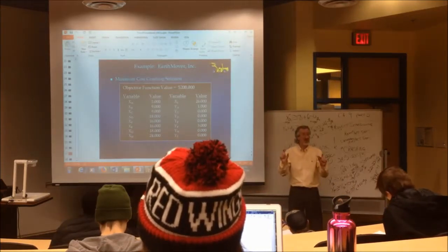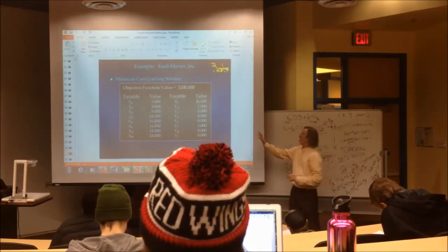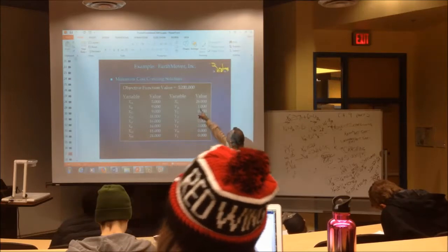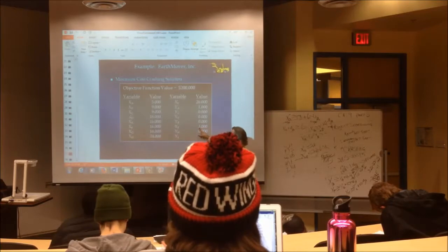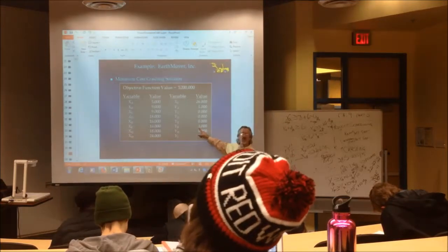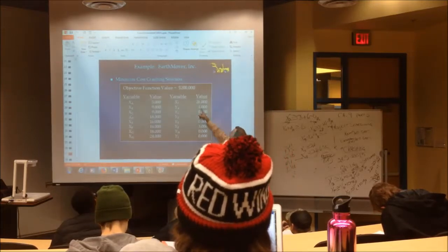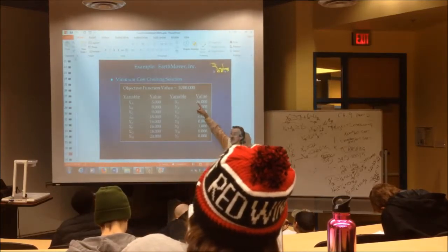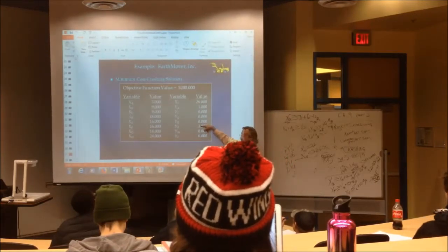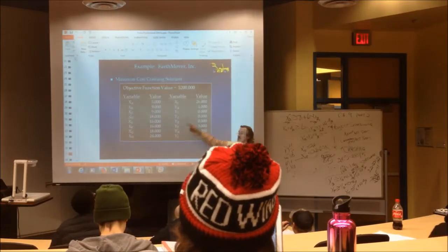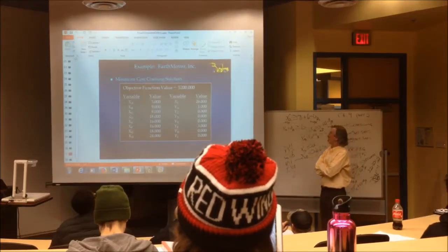You look at the Y variables. The Y variables are telling you which ones are being crashed. If this was 20,000, that means 180,000, so these three must have been 60,000 apiece. Look at the objective function: y sub f with a 60. So 60,000, 60,000, 60,000 is 180 plus 20,000, there's our 200,000. We're cutting 3 weeks off of this activity spending the 180,000, and we're going to spend 20,000 to get a week cut off of activity A, and we're going to get it done in 26 weeks. The lowest it can cost us is 200,000.